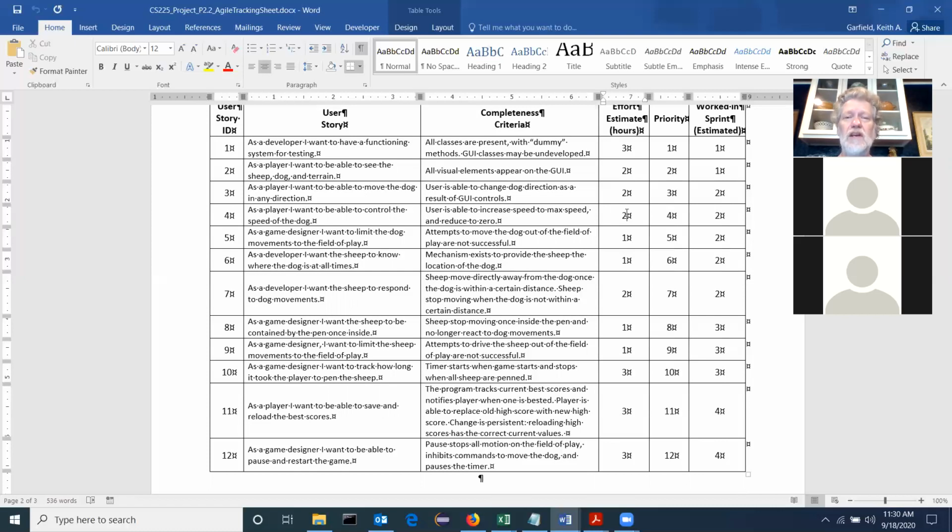You get the framework in now, everything works, and then the rest is you need 1 million data points, or a whole lot of different descriptions for rooms in a dungeon or something like that. So if you're finding that your hours estimate says there's no way I'm going to be done by the end of the semester, that's telling you something, and it's okay to listen to that.